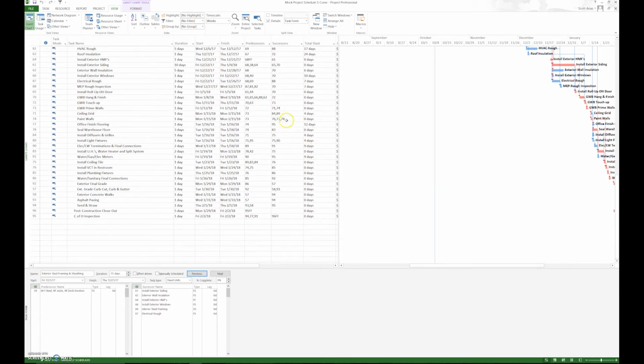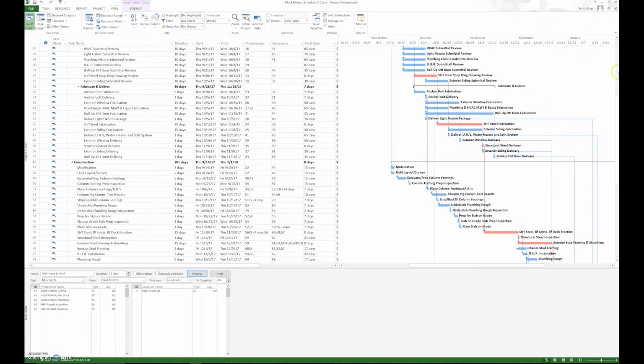So we want to go through activity by activity and look to see activities that have more than 1 or 2 predecessors, or successors, and make sure there's no redundancies that actually occur. That takes some time, as you see, because you have to think yourself through the logic, but it's an important step nonetheless. So removing any redundancies should take a little bit of time. You don't need to spend an excessive amount of time on it.